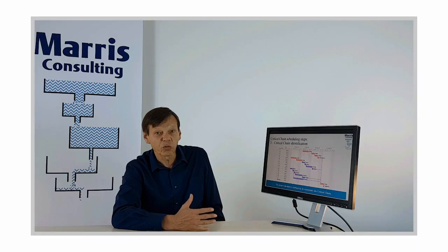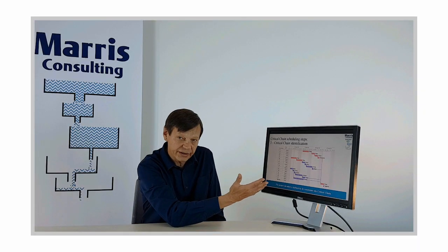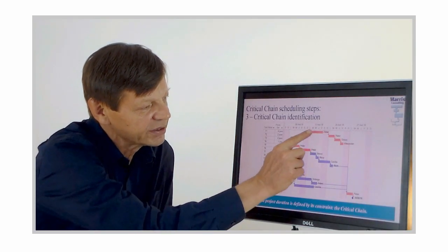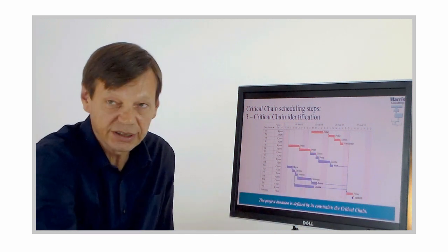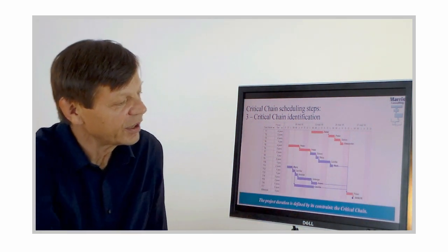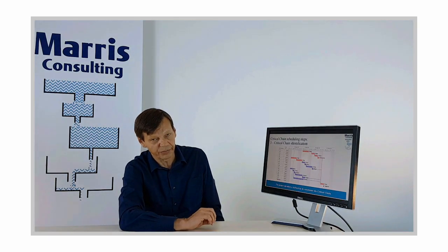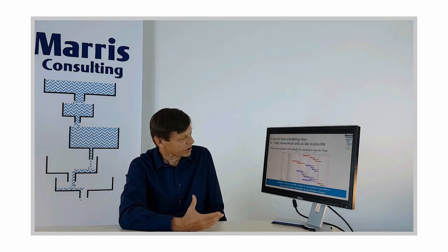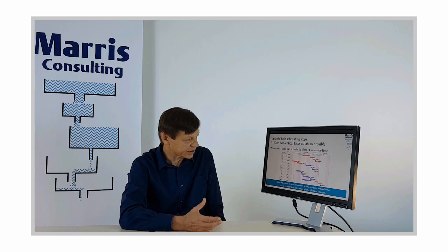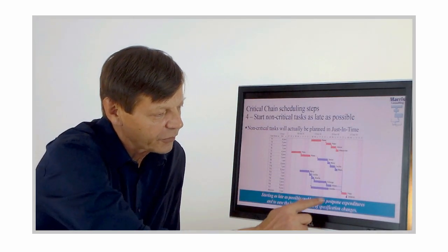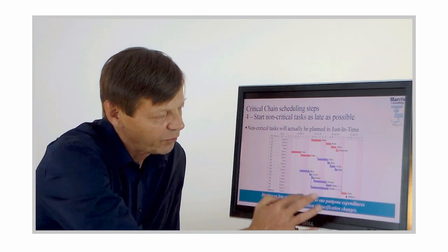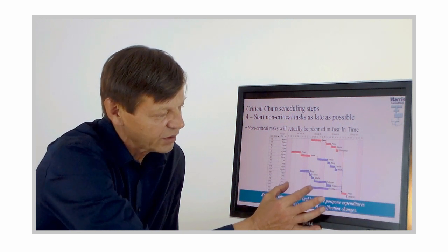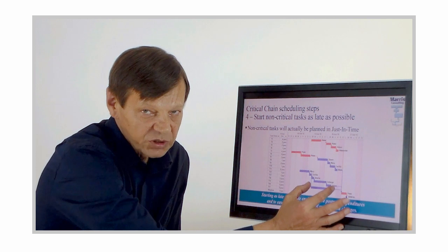and that's good. But what's wrong with what we have here? Would you plan a project like that? You shouldn't, because these are focused durations, right? There's a 50% probability that they're going to take longer than that for each individual task, okay? So doing it this way, you'd be more or less guaranteed not to finish on time, okay? So what we have to do now is first put aside the non-critical tasks, okay? Non-critical ones in blue, here. This whole bunch of tasks, right, could in fact be planned up here as early as possible, or down here as late as possible, right?